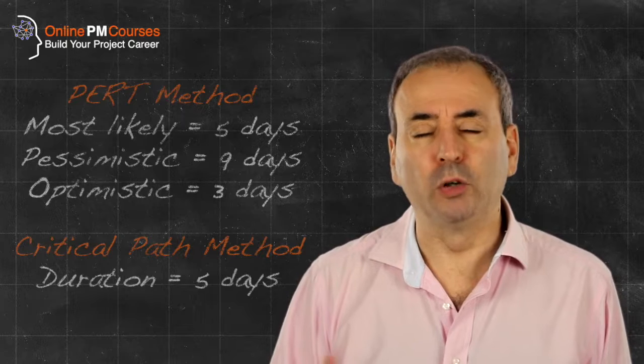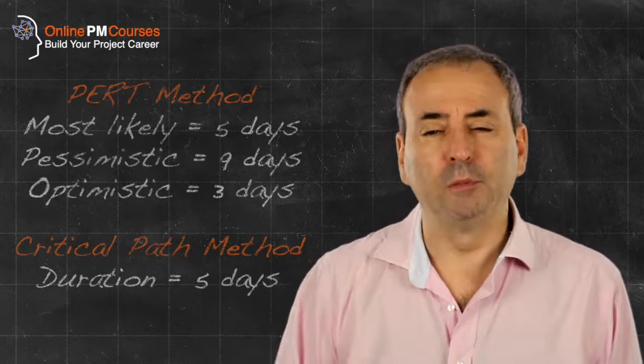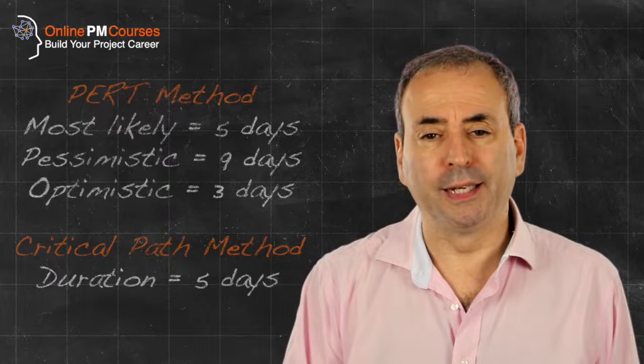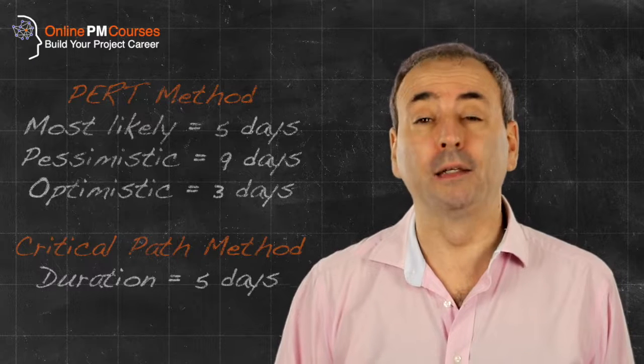Typically these estimates are not symmetric in the sense that the optimistic estimate is not the same distance from the most likely estimate as the pessimistic estimate. So this gives us a kind of triangular distribution.